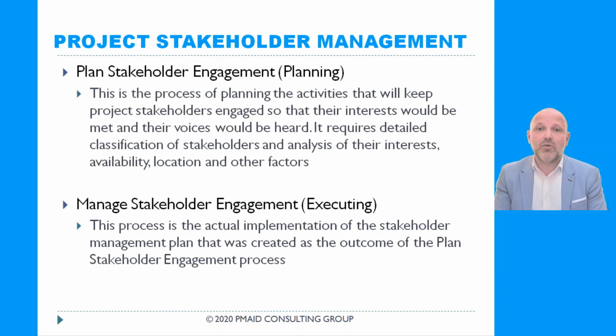Plan stakeholder engagement. That's a planning process. So let's say we know who the stakeholders are. Now we need to know how we are planning to engage them. This is the process of planning the activities that will keep project stakeholders engaged so that their interests would be met and their voices would be heard. It requires detailed classification of stakeholders and analysis of their interests, availability, location, and other factors.